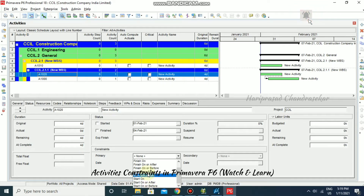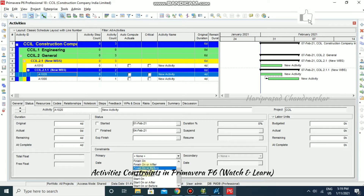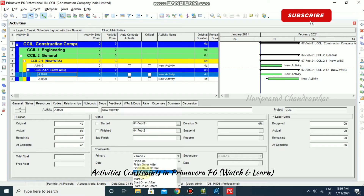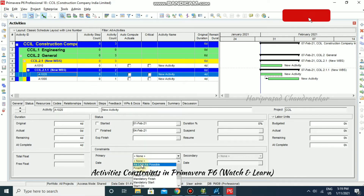Like that, we also have finish constraint: finish on, finish on or after, finish on or before. And we also have mandatory constraints like mandatory start and mandatory finish, and late constraints — only one, which is as late as possible.